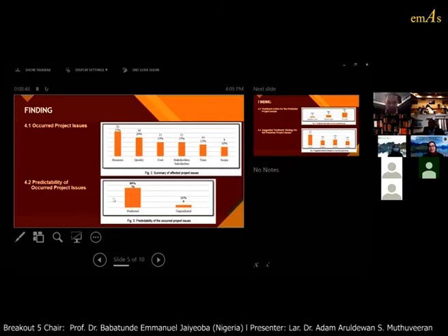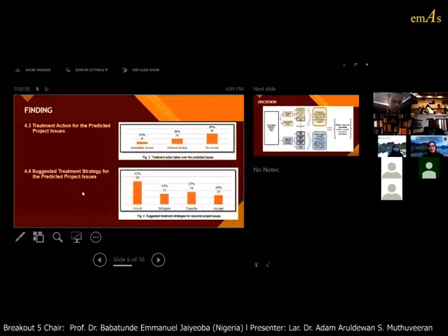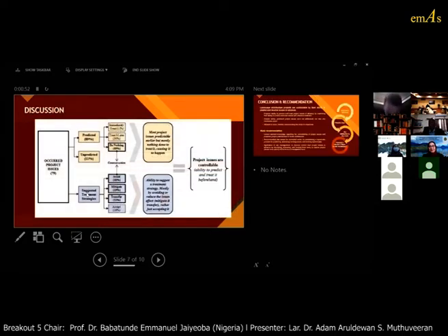So coming to the discussion, I will conclude it. The findings discovered that 89% of the project issues that occurred were predicted in advance. From the total predicted project issues, the majority, 59%, were not addressed, with nothing done about them. Only 11% were addressed immediately, which is supposed to be the more effective way.